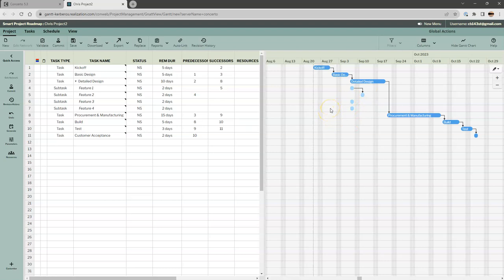That's a different discussion. If you're an MRO and you're interested in that, we can talk more. But typically in a regular project environment, or ETO, or where I'm really planning the project from the beginning, there may be some sequence to these tasks. And we don't know what that sequence might be, but you might say this is the sequence. These 2 tasks can start on day 1, but there's some dependencies on this work. So the overall duration from the tier 2 perspective is 2 days to finish these 2, then 2 days and 2 days, or 6 days. So how does this roll up work from this level up to the detailed design?